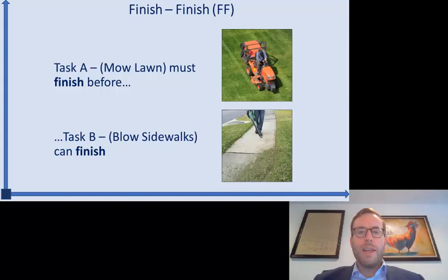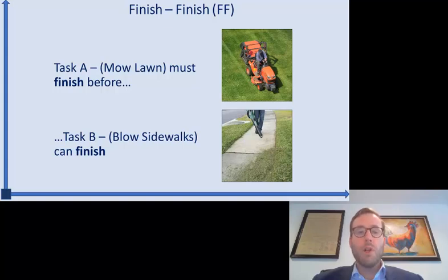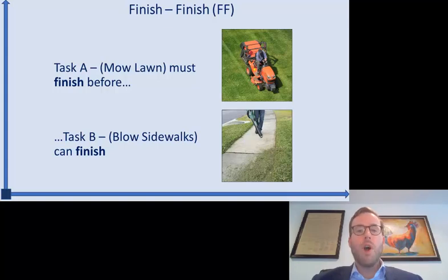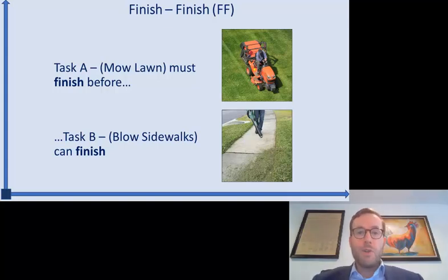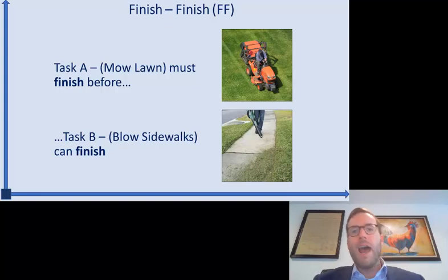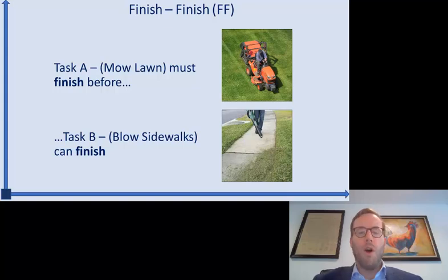The next relationship type is finish-to-finish, where the dependency lives at the end of each activity. Our two activities are task A — mow the lawn — and task B — blow off the sidewalks from the grass clippings the lawnmower pushes onto them. Task A, mowing the lawn, must finish before task B, blowing off the sidewalks, can finish. You could actually do them at the same time — someone with a leaf blower walking right behind the lawnmower — but there's no way to finish blowing off the sidewalks until you've finished mowing the lawn.